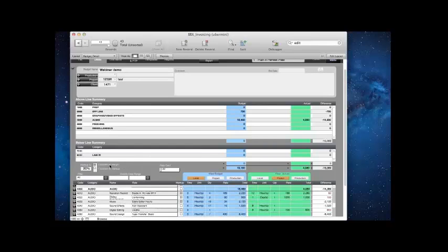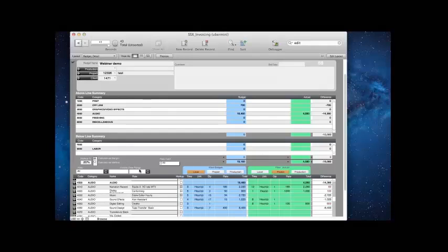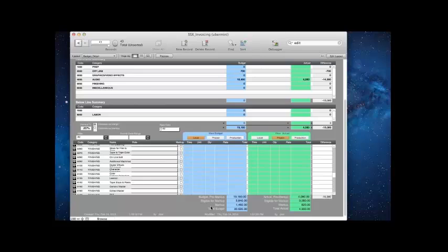And there's two different ways to calculate this, thanks to Paul Santoro. We can calculate it as a margin or as a markup. And it's a slightly different calculation. So let's go down to find out where that is. So here is the amount that's eligible for markup based on these checkboxes. Here's the markup percentage. So notice it's on my budget here, it's 1460. I'm calculating it as a margin. If I do it as a markup, it's just a little bit different. It's 1168. So you make a little money if you do it as margin.